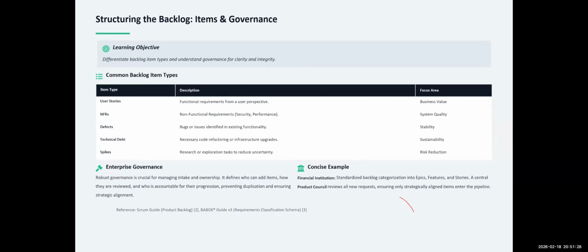So it's to look at the backlog and check that there are no items that are not clear, I mean, that you cannot deliver, right? Or the items were just logged there and they've been redundant for more than maybe a month or two, right? So at that point in time, you need to purge out of the backlog items that have been there for a very long time, right?